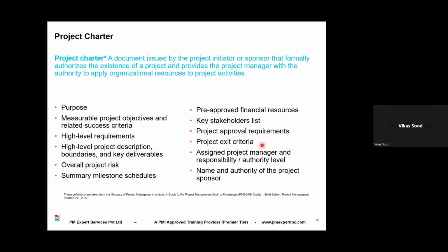But again, suppose it's a customer supplier project. As a part of exit criteria, when you are prematurely closing the project, is the extent of completion of the project important or not? Knowing the extent of the completion of the project is important, right? Yes. And handing over whatever you have done to the customer is also very, very important. Plus, lessons learned as an important check is also important. So again, this exit criteria is those items that have to be completed before you formally close the project, right?